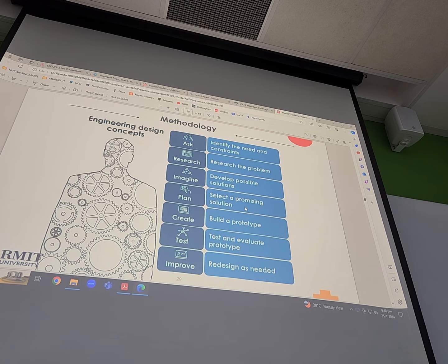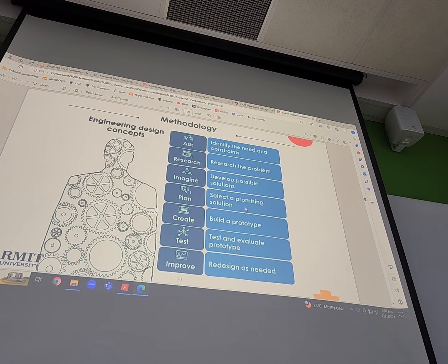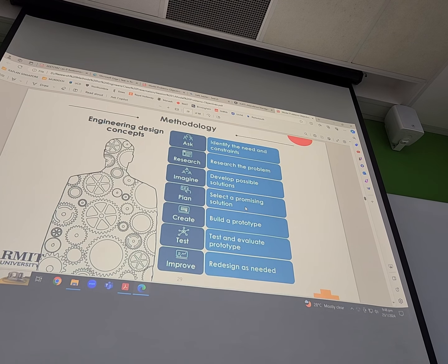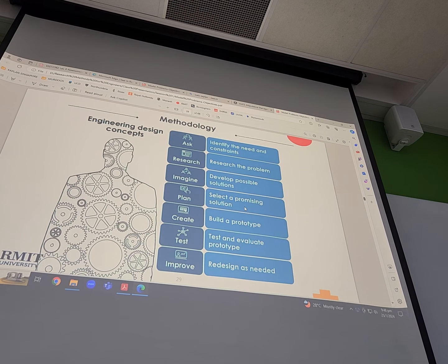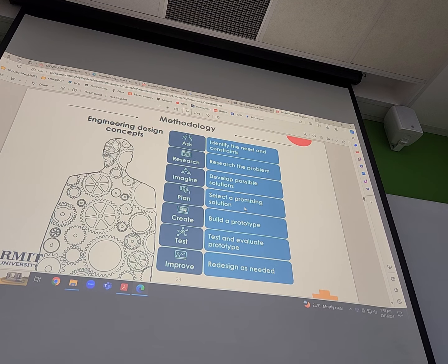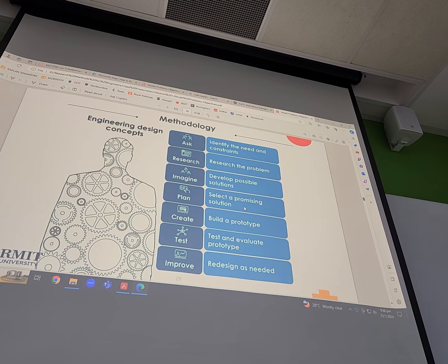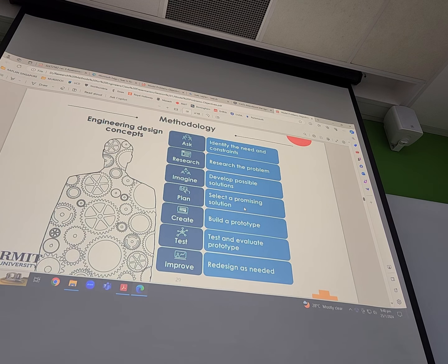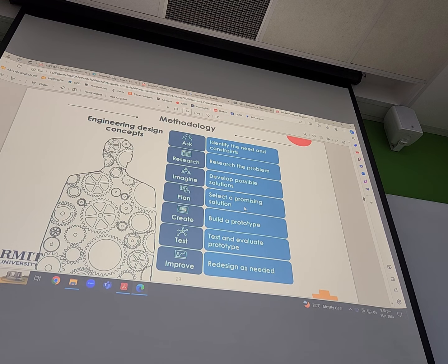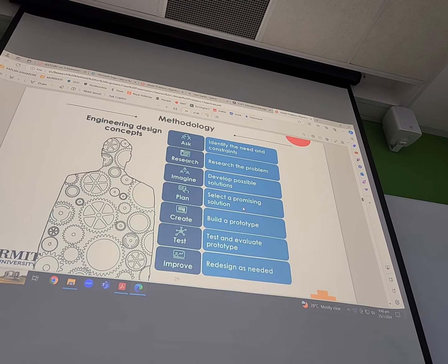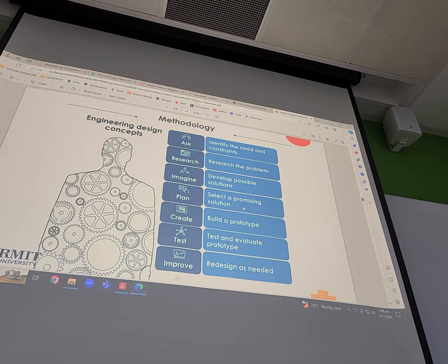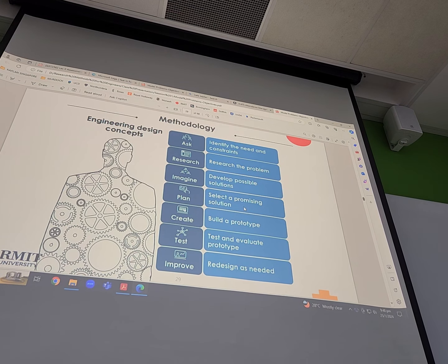Week 1 to week 4 literature review, week 5 to week 6 customer requirements data collection, then week 8 to 9 conceptual design development, then engineering drawings, then weighted index matrix, finding the suitable design. Like that, you need to plan your activities versus time.